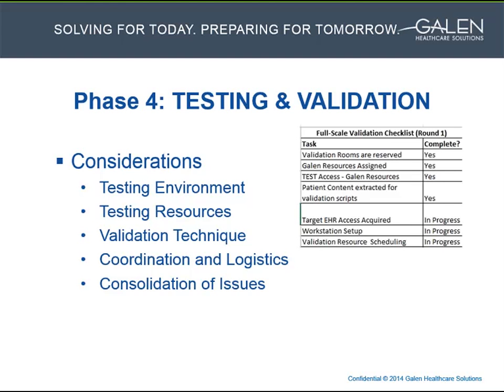We recommend involving a wide range of testers to validate the converted data. We suggest, especially with large or full-scale testing, that the end users, or at least the clinical users, be included in the validation. A client may also want to involve their IS resources and managers in the testing. Overall, it's important to include people who are familiar with the data and the workflows in the target system.